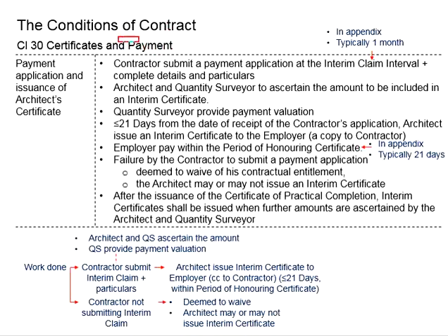You know that the payments are made after the contractors have completed the work. The contractor cannot be paid for the work that he has not done, and the amount of work completed by the contractor will need to be ascertained by the architect and the quantity surveyor, and translated into the amount of money to be paid to the contractor.